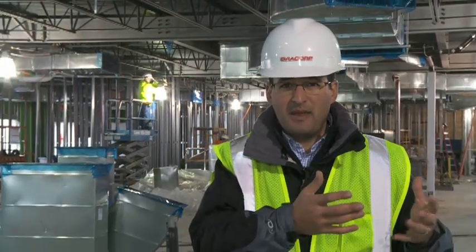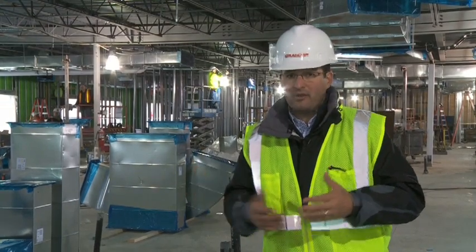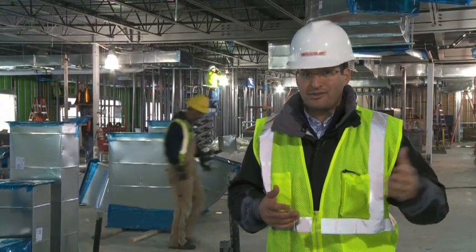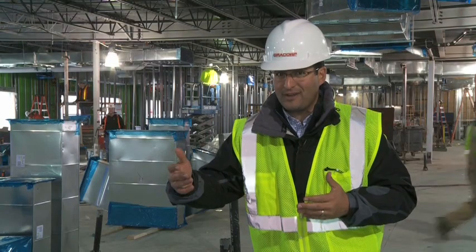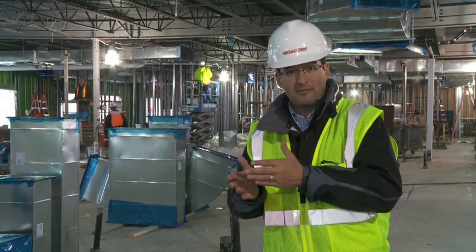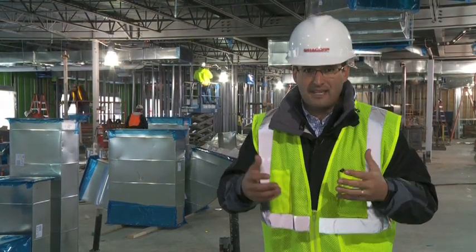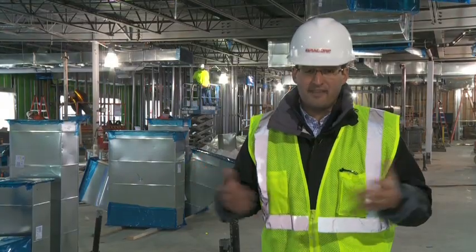Thanks, Tom. You know, you're right. Construction is full of change orders. And what happens usually is when an electrician gets the set of plans and goes to rough out a room, he finds there's something wrong with the plan. The receptacle isn't the right space or some other problem. So what he has to do is then go to his foreman. His foreman has to go to the electrical contractor. Electrical contractor has to go to the general contractor. General contractor has to go to the engineer. And then it has to filter back down right to that craftsman who, if he can identify problems earlier before those plans even get to him, it's going to save a lot of money and it's going to save a lot of time.